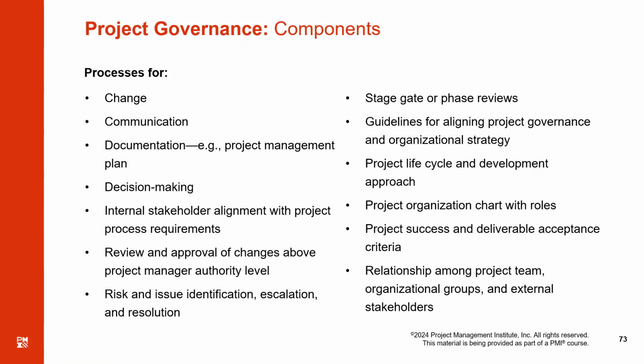How the project success will be defined and how the deliverable acceptance criteria will be defined, there might be certain instructions on that. The relationship amongst the project team, organizational groups, and external stakeholders, how will they interact? Do they need to interact very often? Do they need to interact sometimes? Or maybe some people have to interact with some but not with others. So all this has to be defined.